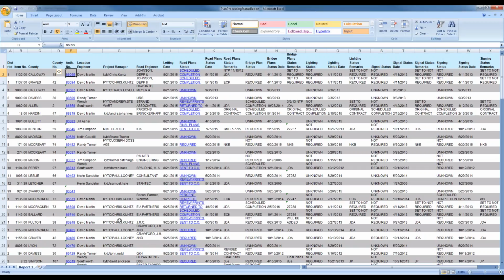So for this report, for example, if you have sent check prints in, you can click on the plans status link to open Clearview, and it will open to the project page. Input the submittal date to central office in the milestone. Once plan processing has reviewed, they can go back into Clearview and key in the status that it's returned to the district.